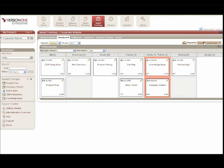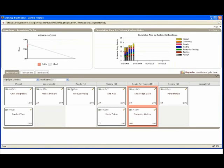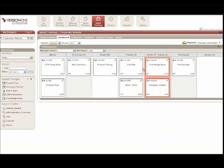The other addition as part of this release — we updated the stand-up dashboard as well. It now includes a tab for your storyboard, so if you're doing that stand-up practice, you can use this interface. We also updated the cumulative flow on the stand-up dashboard so it allows you to configure it and look at your custom Kanban status. The cumulative flow is important to any organization trying to understand bottlenecks — it allows you to see the history of how things have flowed through the pull system from a status standpoint. At this point, I think we've covered the main parts added for Kanban — reporting, cycle time, the stand-up dashboard, and how to use and configure your Kanban on the storyboard page.